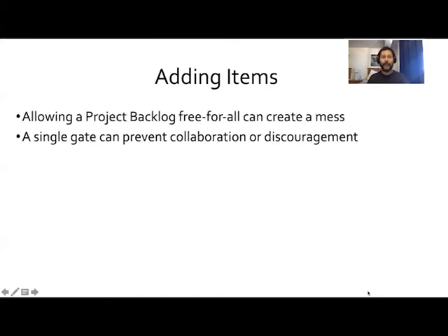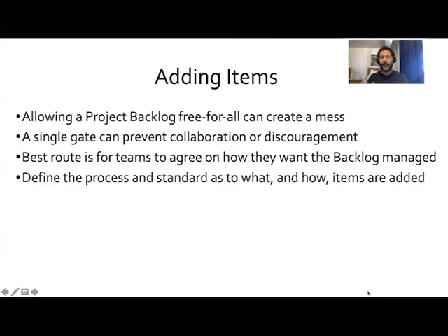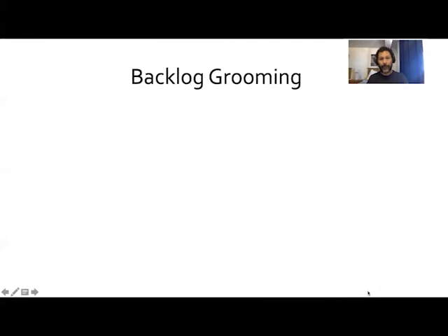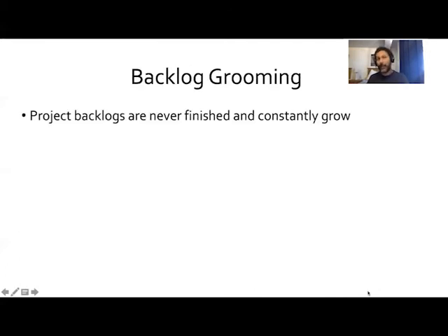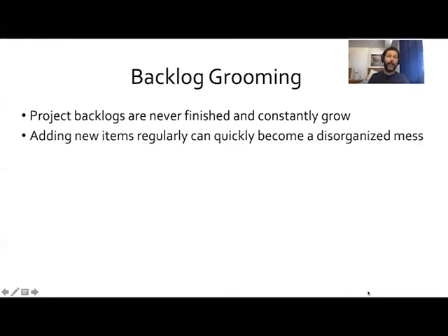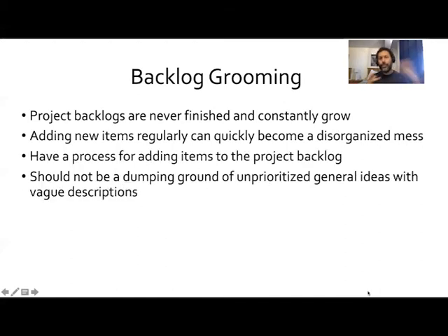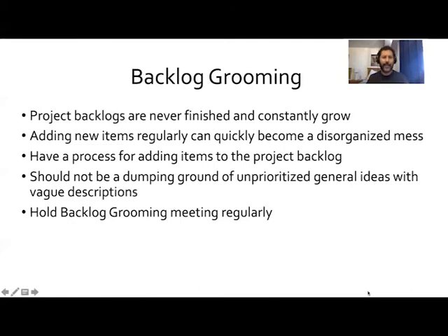So I already talked about this. You want to define a standard amongst your team on what works best for your backlog. And then you want to have backlog grooming. Every once in a while, look at the backlog as a team and decide, okay, what's old? What are we getting rid of? What has changed in priorities? What did we think was a really high priority, but we found as we go on this journey that we're either going to cut that feature or it's not as high a priority? I would have these meetings regularly.